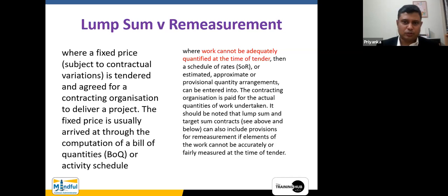Now, in this part of the world, in Oman conditions of contract, we have clause 55, estimated quantities, and clause 56, actual and correct quantities. But in a BOQ which has been designed based on clause 56, there is also an element of remeasurement, which we put within brackets as provisional. So all these words are appearing across different ranges of standard forms of contract.